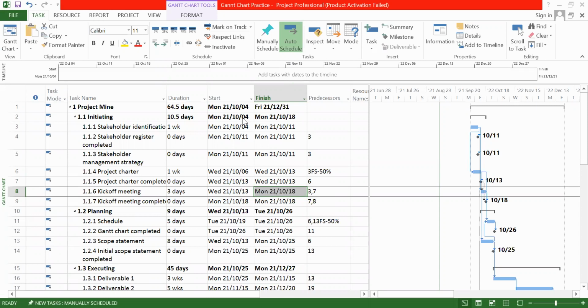Time's up, and now I'm going to show you the steps. Step 1: go to the task menu bar and the task option. Click the down arrow mark and click recurring task. Step 2: click the task option in the menu bar. Step 3: select recurring task.